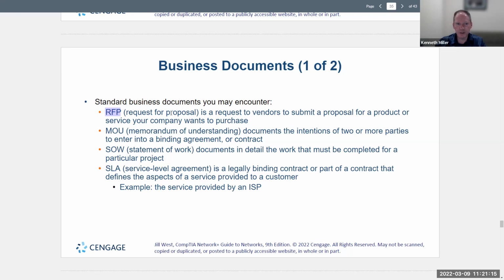Break that down. So if your RFP is well written, it will say, you must itemize the following details. That way the vendors don't have that wiggle room to say, well, it's just 10,000 and 5,000 of that is profit, where you can't see that you're getting taken advantage of. And it makes it easier to compare apples to apples when you look at vendor 1 versus vendor 2 versus vendor 3.